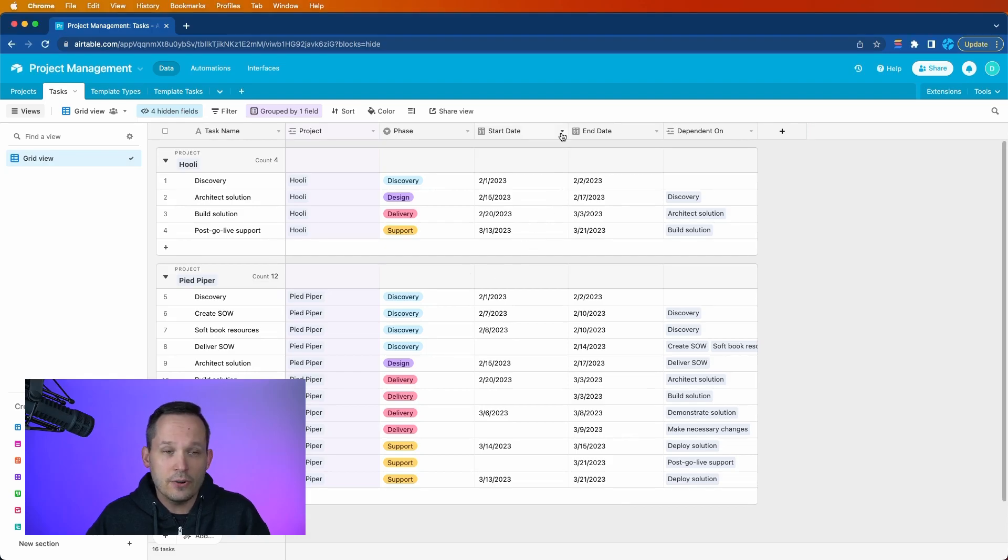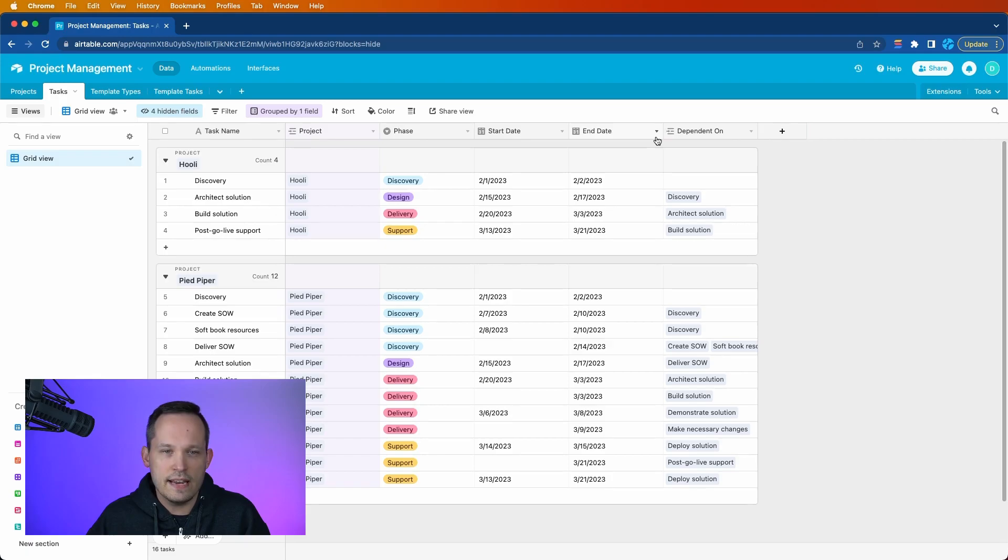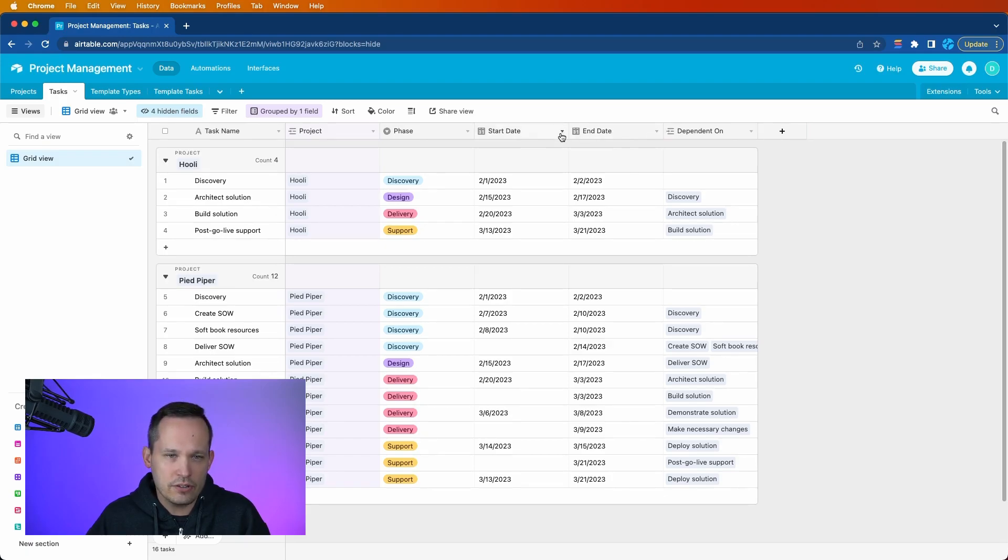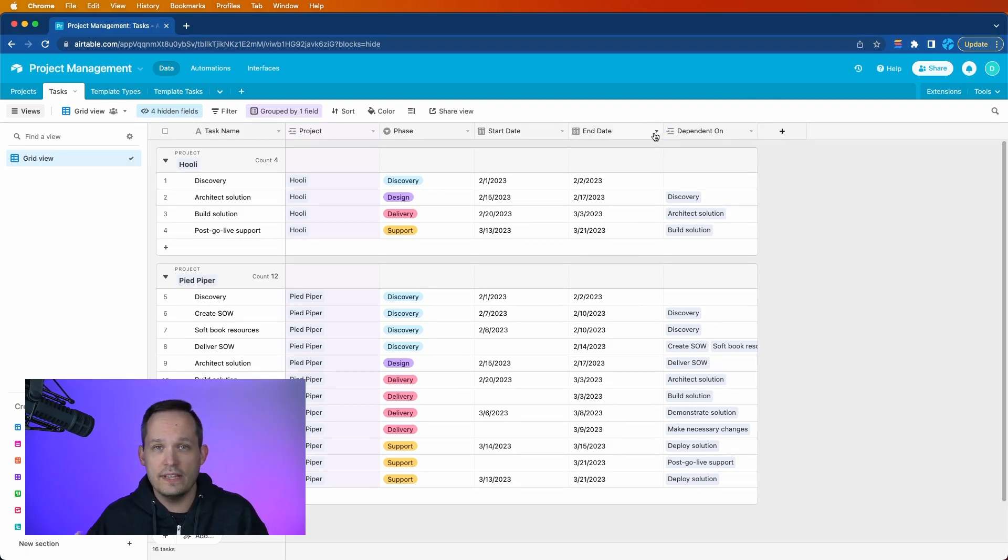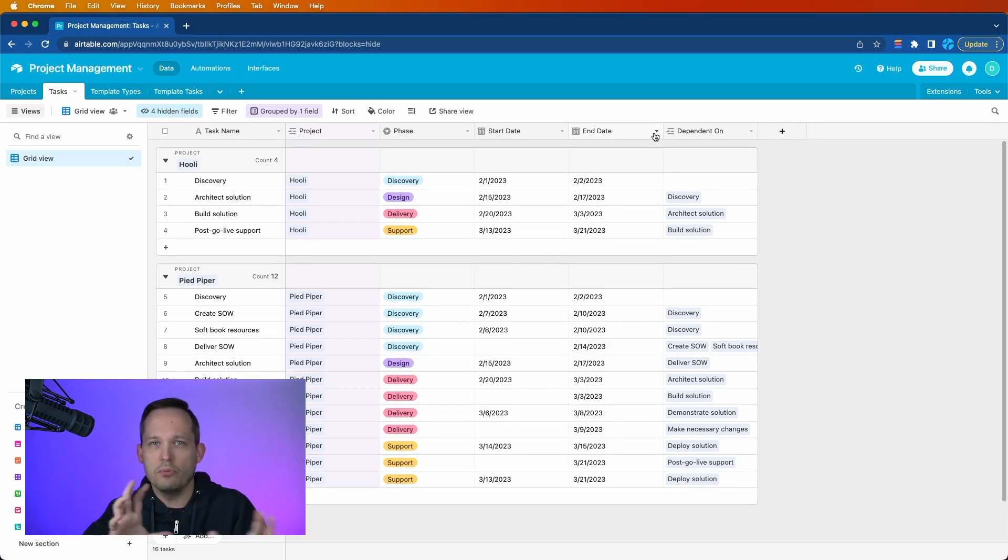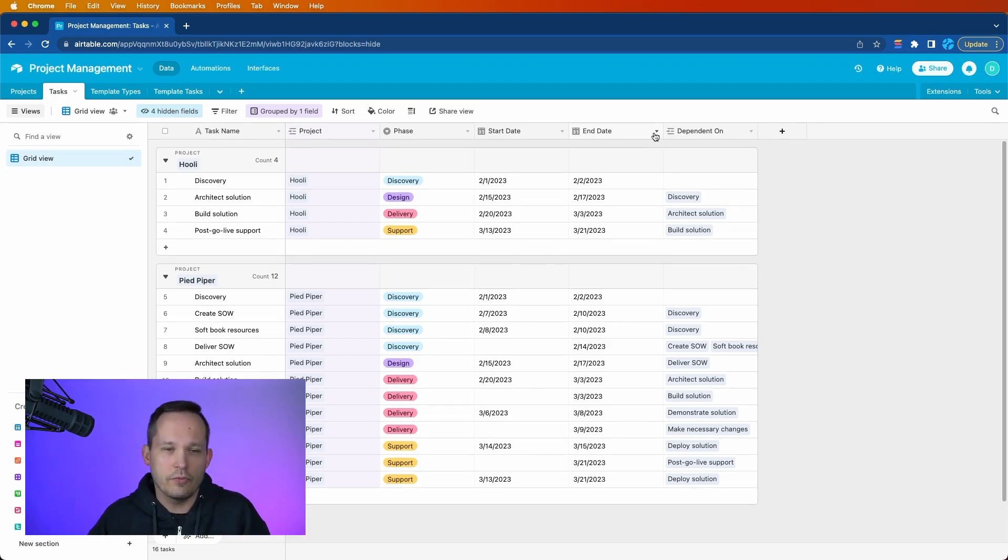I also have a start date and an end date, and both of these are date fields. They're not formulas. So for example, I don't have a start date, and then I add three days, and that equals an end date. I want the actual date fields because we're going to be able to move the dates around, and that wouldn't work if we were utilizing a formula.